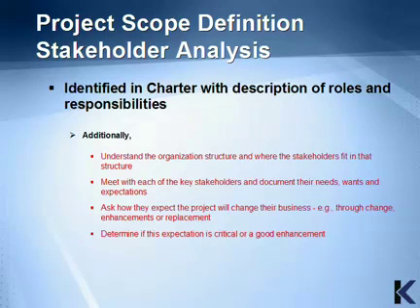Not only are you adding more detail to the expected project results or objectives, it's now important to describe them and how they'll look when the project is completed. You also need to prioritize them. This is the time to make sure the stakeholder list is complete and no key stakeholders have been missed. If a key stakeholder suddenly shows up in the middle of your project, the results can impact your budget, schedule, and various other plans. In the next section, we'll discuss the output of this process.